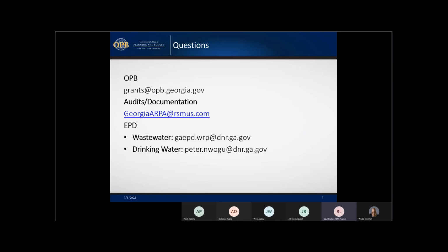Appendix 2 to 2 CFR 200 also includes compliance with the Clean Air Act and Federal Water Pollution Control Act, in addition to equal opportunity and Davis-Bacon and others. And so these are things that our team will be confirming and validating compliance with through the review of the supporting documentation that Jen mentioned on the prior slide. So we will be obtaining and reviewing those documents at the payment request submission, through that process.